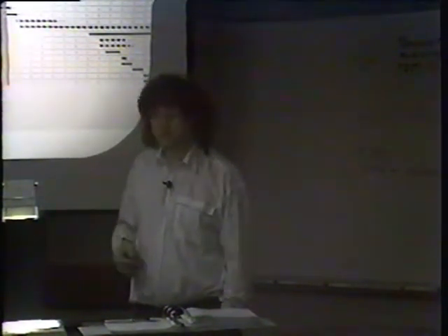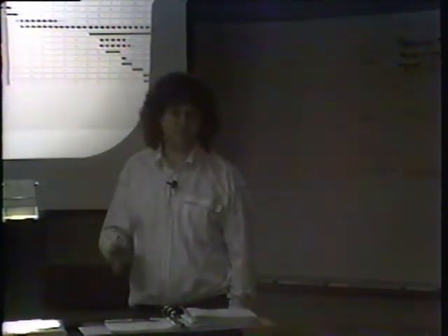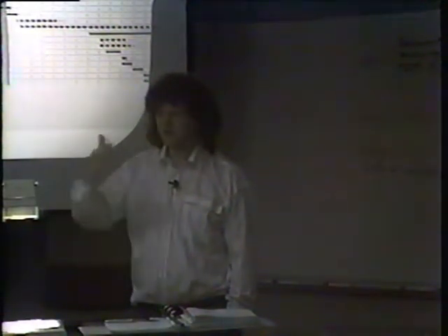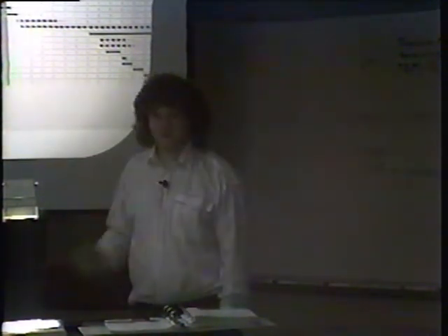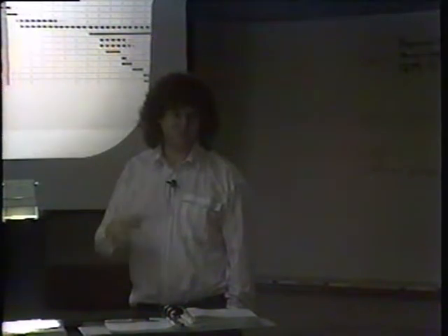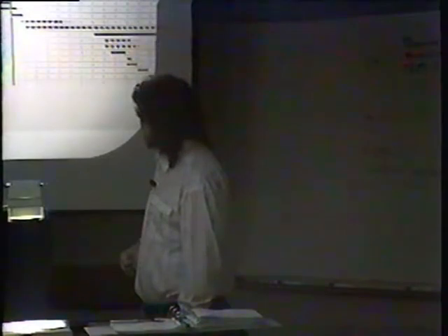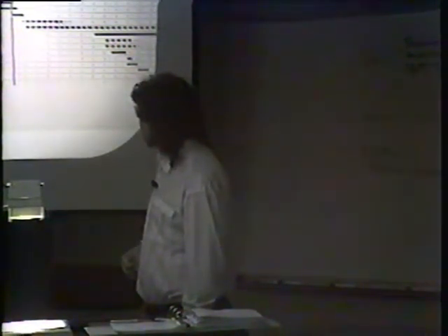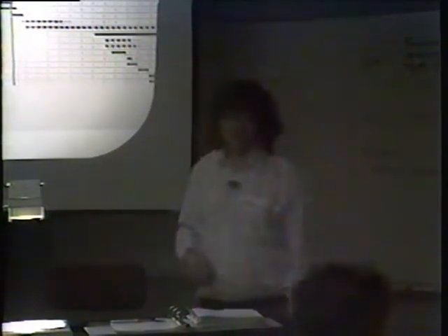Freeze COS, investigate which UNICOS release to install. At this point, 5.0 and 6.0 are the likely candidates, each to their own. I would expect 5.0 installations to start occurring all over this spring and summer. April, May, June, July, and there's going to be a real migration hump with the release of 5.0, of lots of people bringing it up on the system. So they should have already got their licensing going well before now. Then you decide on your migration path, figure out what method are we going to use as it goes.